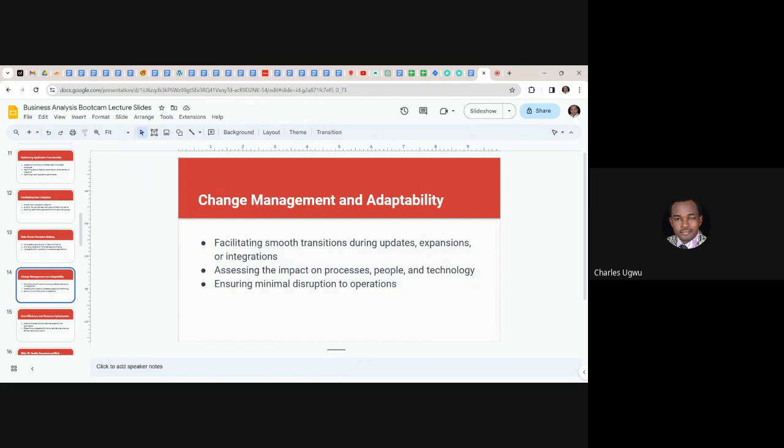But we are coming to that. That's what we call UAT. After every implementation or configuration, there's what we call UAT, user acceptance testing, to make sure that everything is tested. If it didn't go well, you are not going to pass it. If it goes well, you pass it. That's how every single code, every single configuration must be tested to make sure that it meets the user stories acceptance criteria. These are some of the things we are going to do as we proceed.